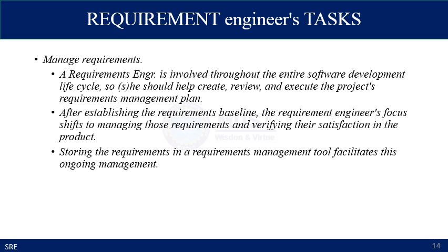So as described earlier, a requirement engineer is involved throughout the entire software development lifecycle, so he or she should help create, review, and execute the project's requirements management plan. After establishing the requirement baseline, the requirement engineer's focus shifts to managing those requirements and verifying their satisfaction in the product.